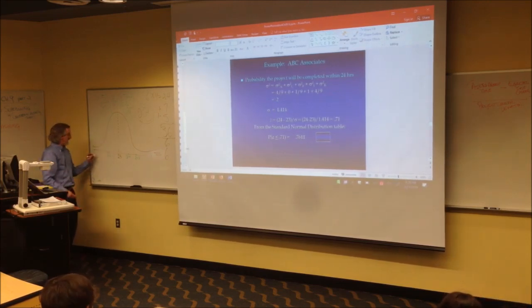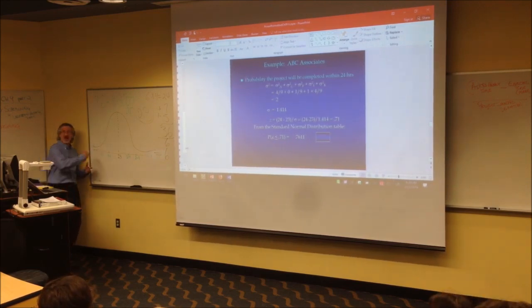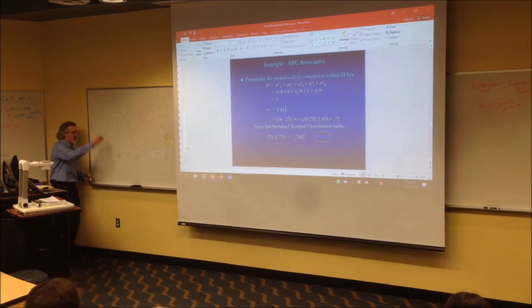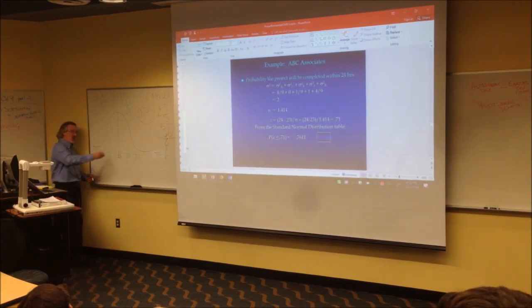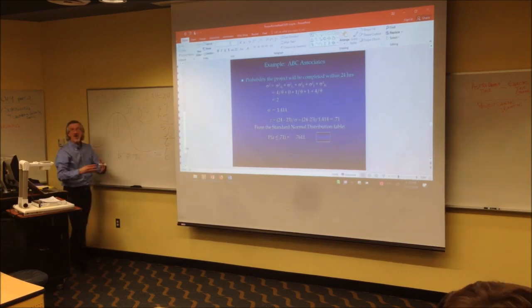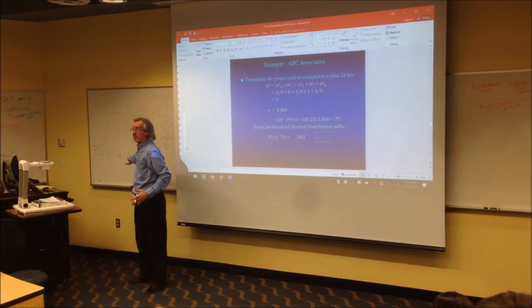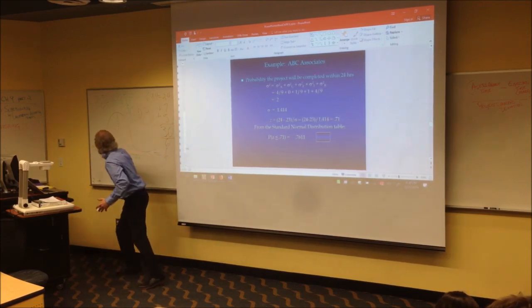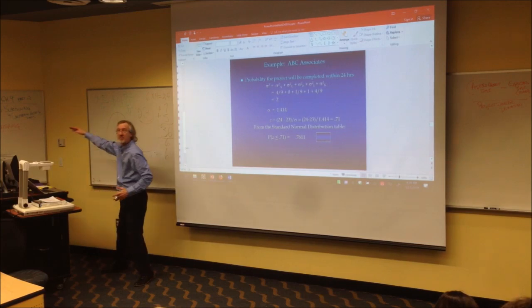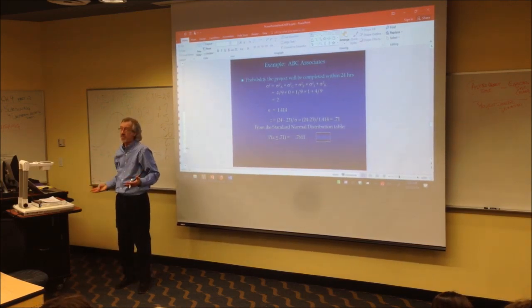Is that right? Now we're subtracting another 1.4, so we're at 20.2. My number line doesn't look normal because I didn't use 22, 21, 20, or 24, 25, 26, but I put these numbers right following the empirical rule, and I know that wherever the number we're about to measure is, it's going to fall in the right place, and I'm going to know the probability for whatever time or less. And the opposite would be whatever time or more.